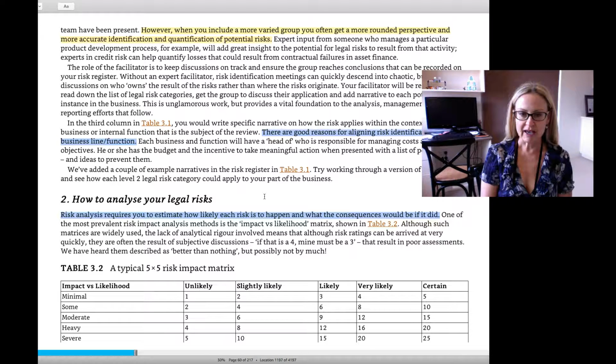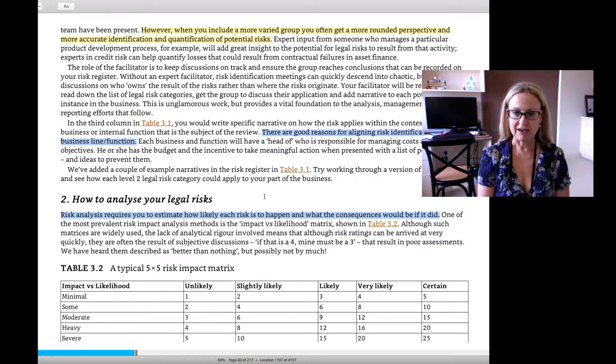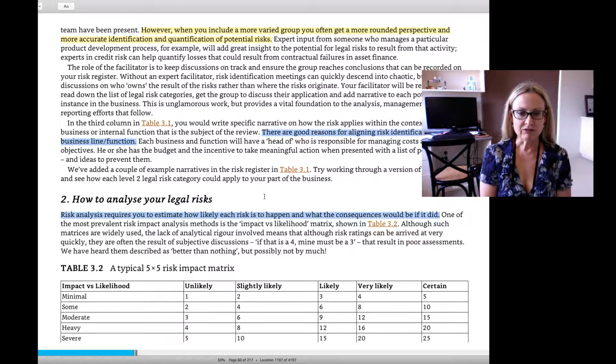And you're looking at the various different risks that have been identified and numbered in the previous step, and they're then entered into this matrix. Okay, so you've got the likelihood running across the top and the impact down the side, and each of those risks has been slotted into that matrix there and assessed for its nature.